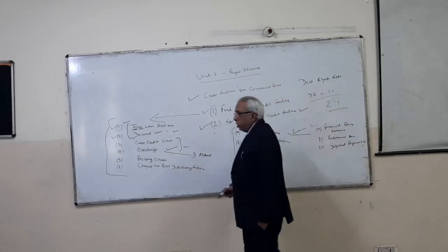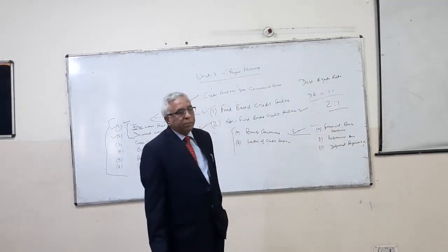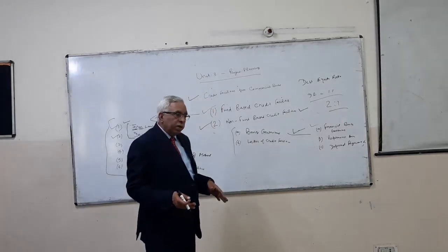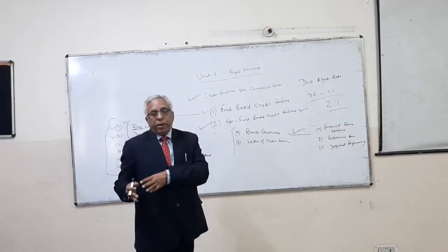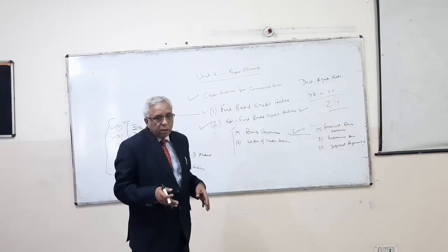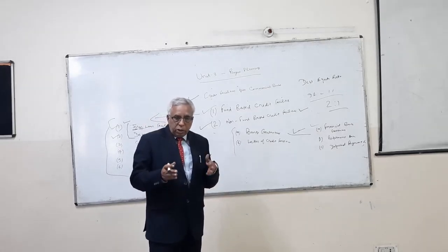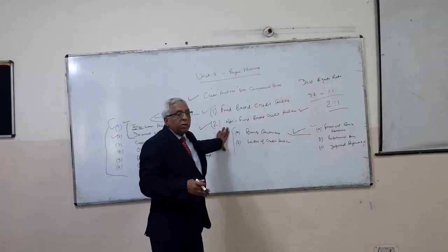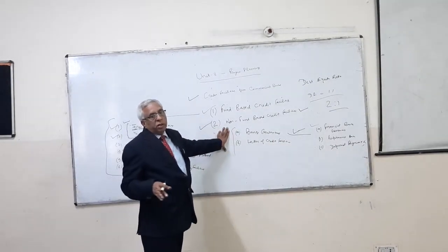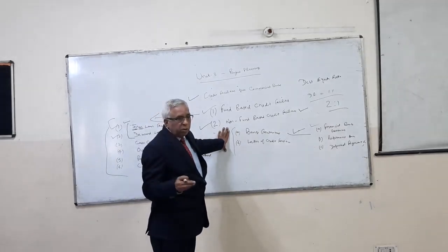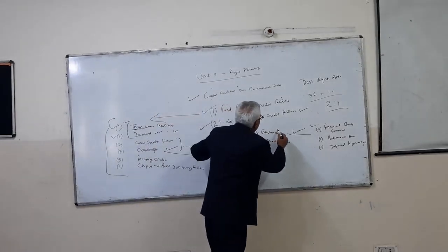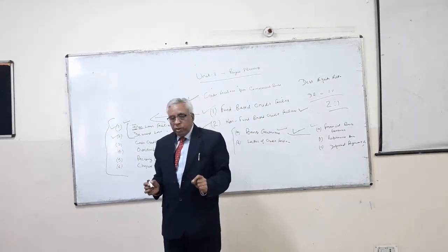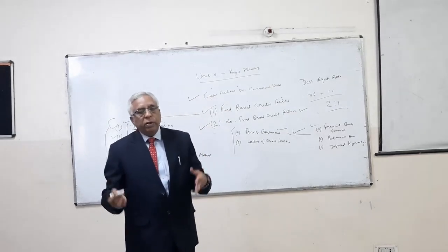Under financial bank guarantees, there are some financial obligations on behalf of the company, such as some taxes and other things. If the customer fails to pay within the regulated time, the company that has been issued a bank guarantee on behalf of the customer will send a letter to the bank, and without referring to the customer, without listening to him, the bank will immediately pay the amount to the government authorities or the authorities which have given you the contract.